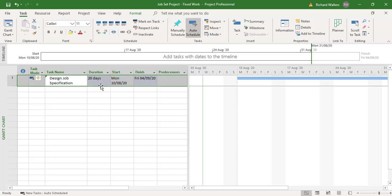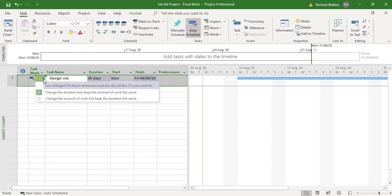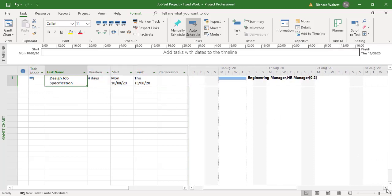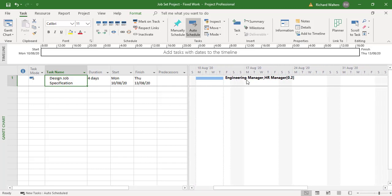So the duration has now changed — that wasn't fixed, which is the reason why it changed. We can see what the message says: change duration and keep the same amount of work, or change the amount of work but keep the same duration — which is what we want, so we select the second option. Now we've got the engineer manager and the HR manager at 20%, and the duration is now maintained the same.